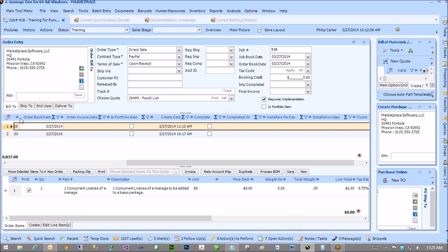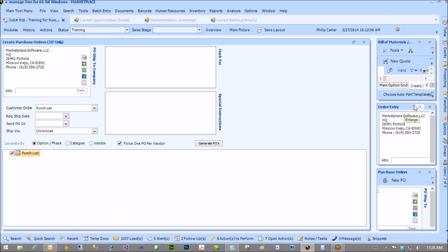Okay, so again, if this had value to it and you needed to invoice your vendor for the expense of fixing their mistake, you can just go into this order, change the bill to, and you can actually invoice your vendor, right? It won't change the project. It just changes that you're billing this one order to your vendor to get that money back. Okay? Any questions about that?